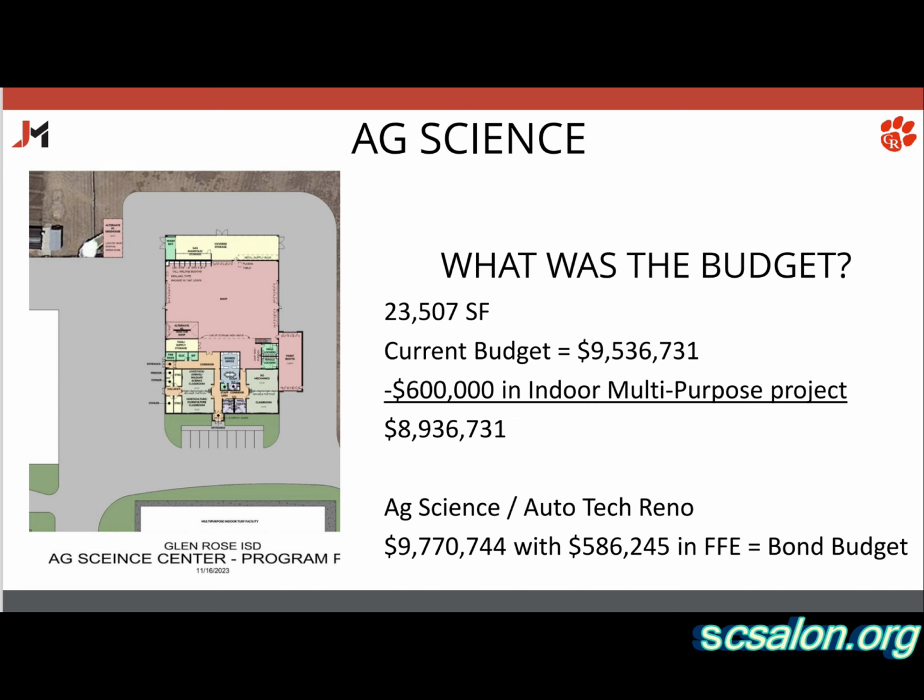And then in this project, there will also be another drainage project. There's a flume that comes in right here behind this building. It brings water all the way from the highway down a flume, and it dumps behind this building and comes this way, right through that flume to the street. And that's what causes a good chunk of the flooding here. So we're rebuilding and redesigning this, but we're going to divert this water behind the building in this direction.